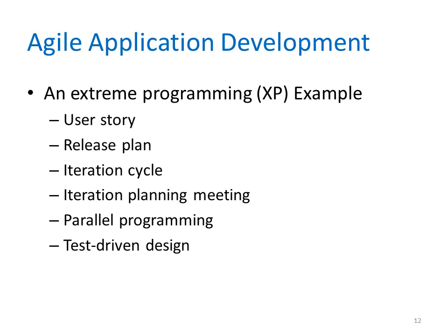Projects are often composed of many user stories from which programmers can estimate the scope, time requirements, and difficulty of the project. In addition to user stories, frequent face-to-face meetings with customers provide a higher level of detail as the project progresses. The team must also develop a release plan which specifies when user stories will be implemented and the timing of releases.